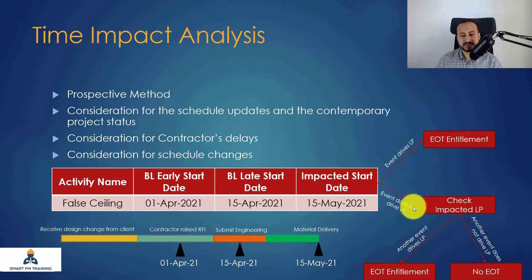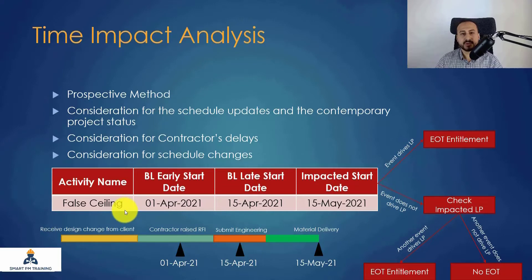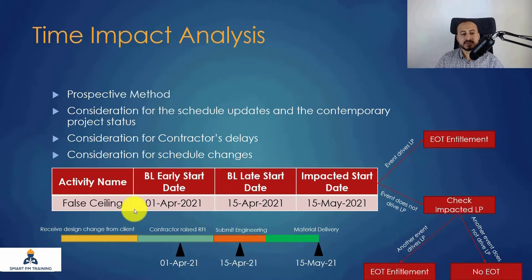If the event does not drive the longest path, we check the impacted longest path first. It is possible that another event is driving the longest path. For example, beyond the false ceiling delay, there could be two or more delay events — and when all events are inserted into the program, only one may drive the longest path.